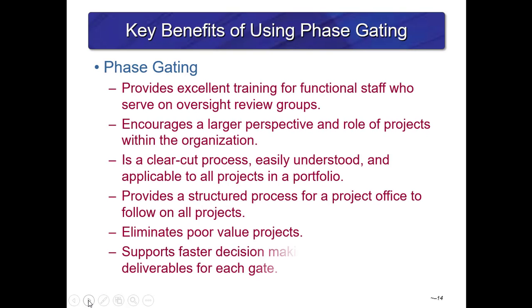Benefits of using phase gating or stage gating are that it provides excellent training for functional staff, encourages a larger perspective and role of projects within the organization, is a clear-cut process, easily understood, and provides a structured process for a project office to follow on all projects. It eliminates poor value projects and supports faster decision making with predefined deliverables at each gate.